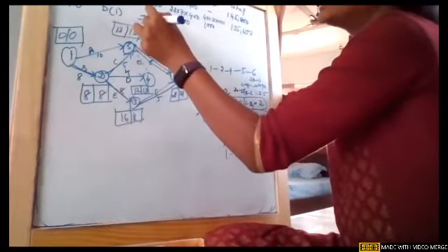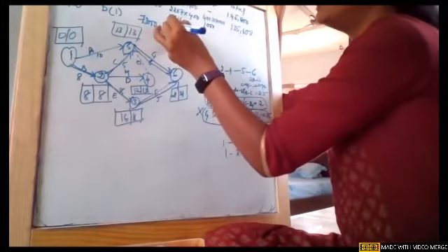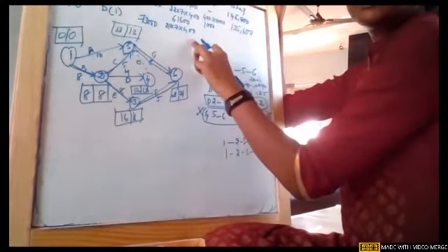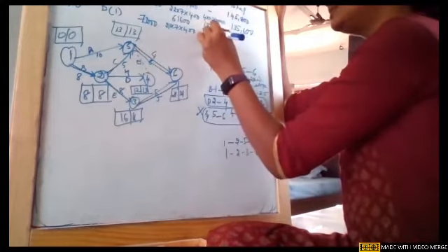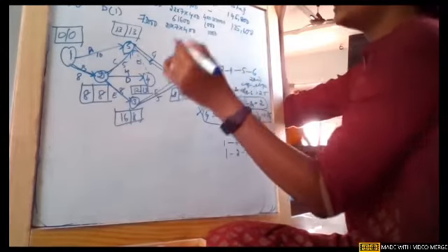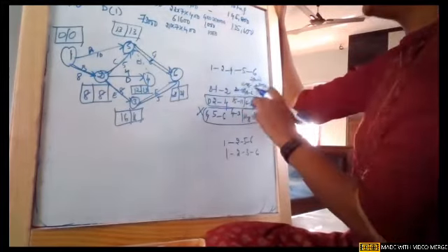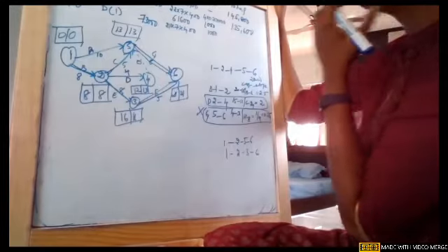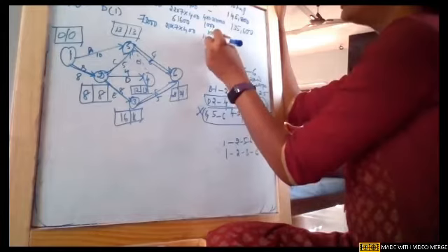The normal cost is obviously the same, which is 73,000. So the indirect cost is 21 into 7 into 400. And meanwhile, some of you calculate this value, girls, 21 into 7 into 400. And the crash cost is, earlier value 1000 will remain as it is, plus now what is the next activity which we crashed? The cost slope is 1 into cost slope 2 into 1000.